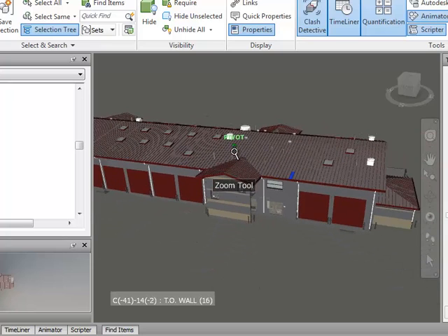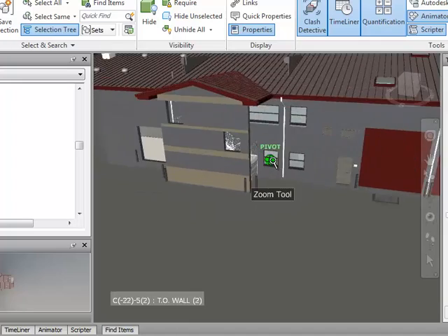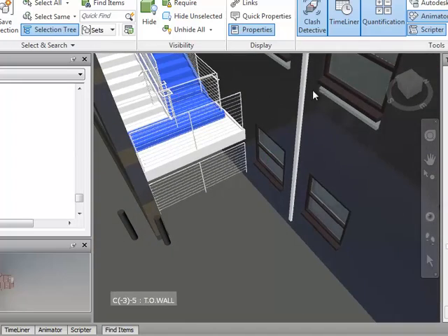Did everyone tackle the extra credit? Yeah? Kind of? What about the stairs? Yeah, someone brought that up too, that it wasn't showing you what material it was. If it is steel or concrete, concrete would belong to the concrete division. So that would be an RFI.